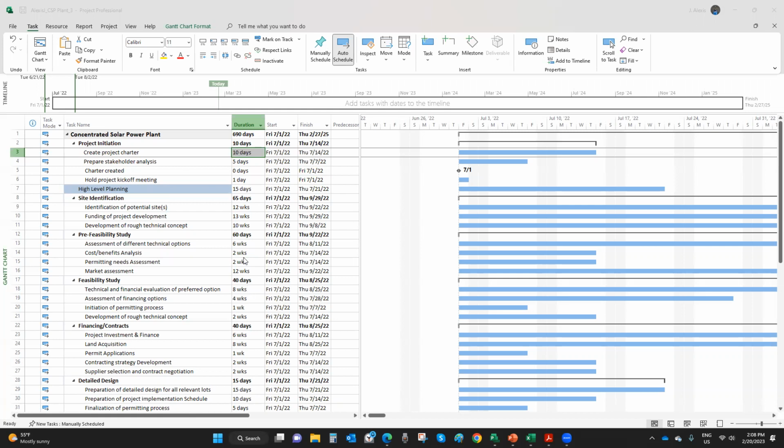The 690 days and the ones at the sum, right? I'm not getting it on my system. It's not summing up automatically. If it isn't summing up, it means you didn't create your hierarchy properly. So review your hierarchy. That's what allows the software to sum up sub-items to the summary item. Okay, Professor. Do we have other hands?